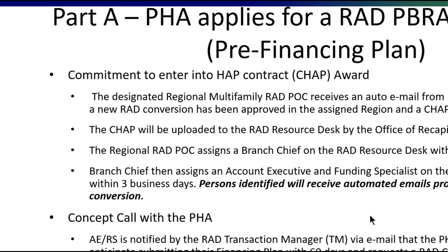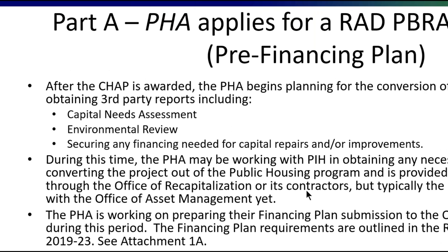through that. So again, the automated email will be notifying, and the concept call is typically about 4 to 6 months after the CHAP has been awarded. So it depends obviously on the transaction and the project and the PHA, how fast it's moving. So moving to page 8, now this is less involvement on your part, but it's more to be aware that the transaction is moving forward.